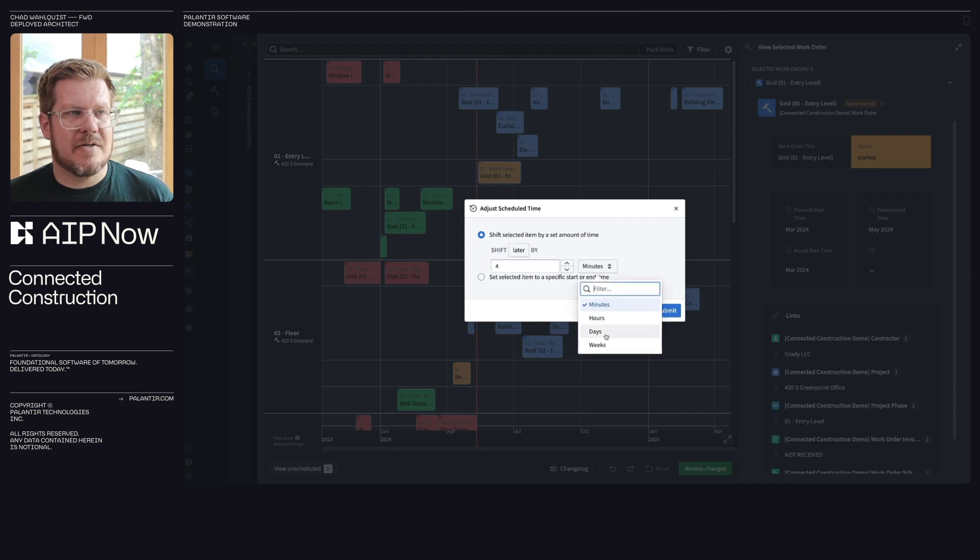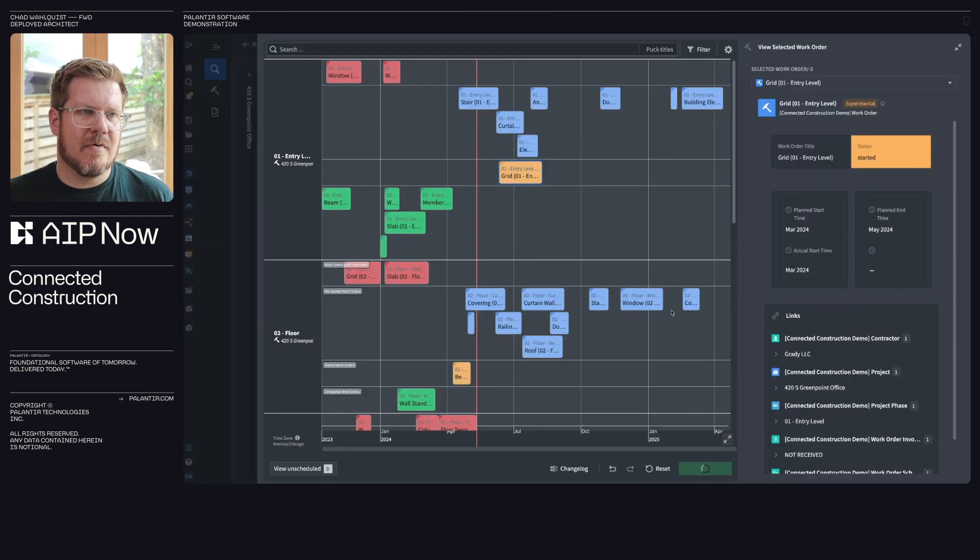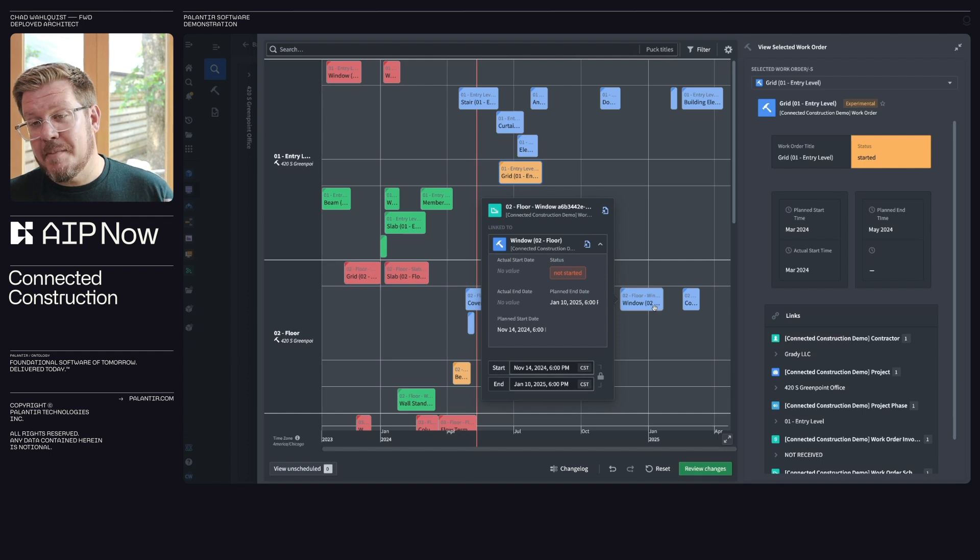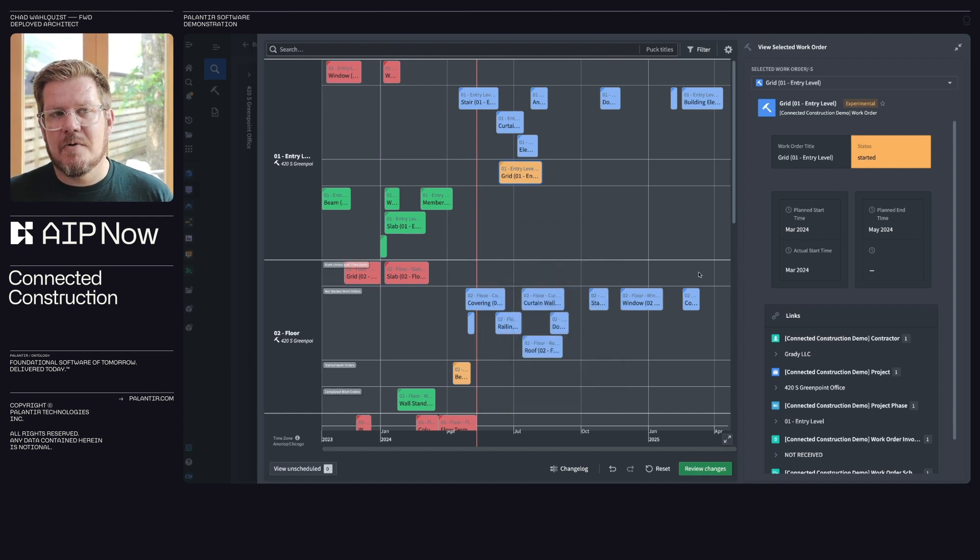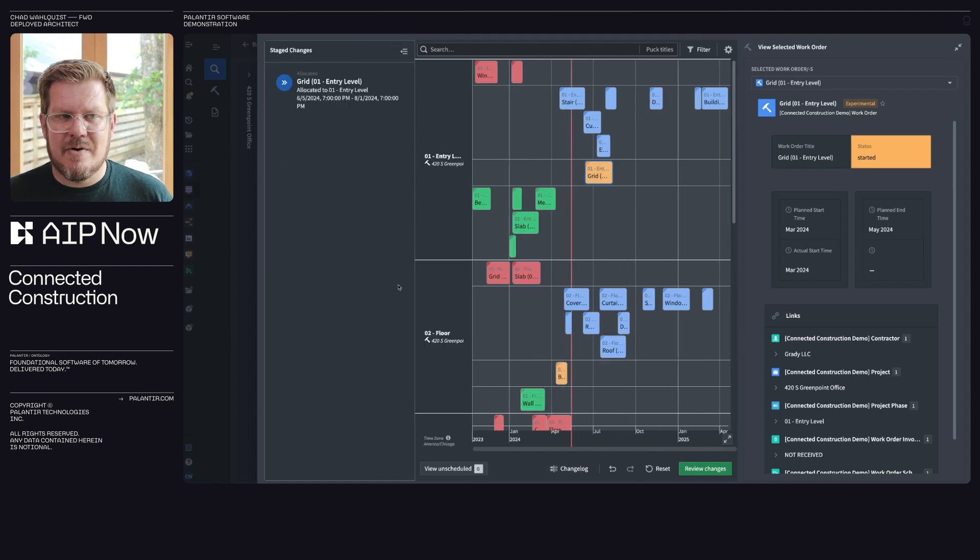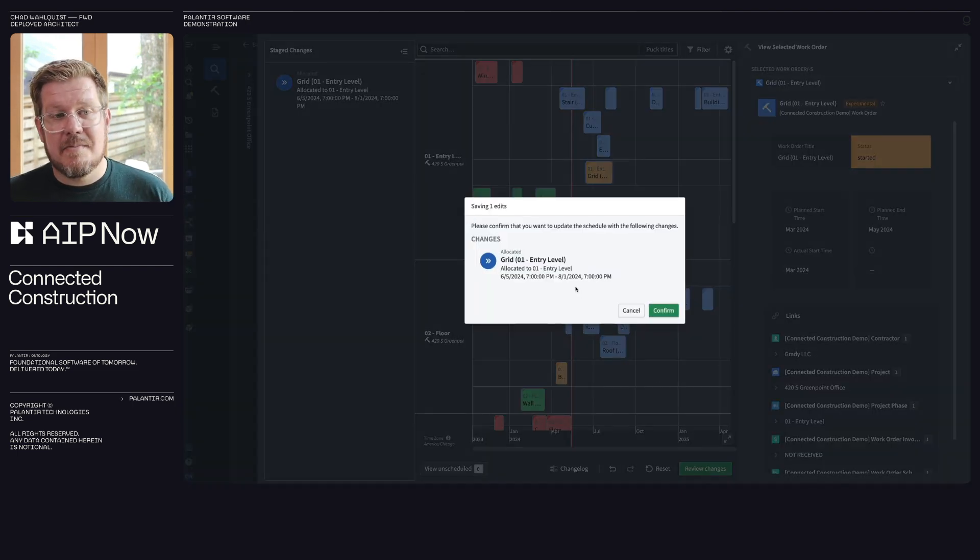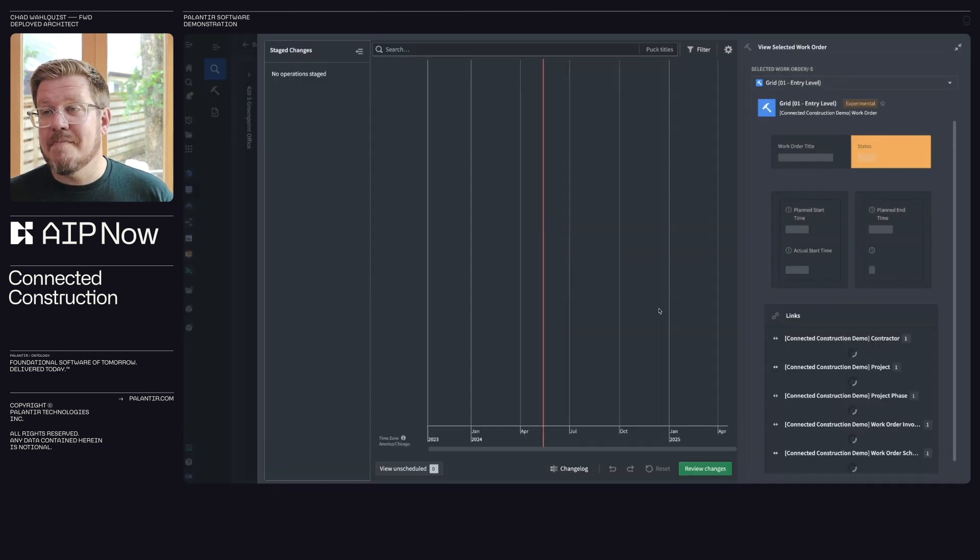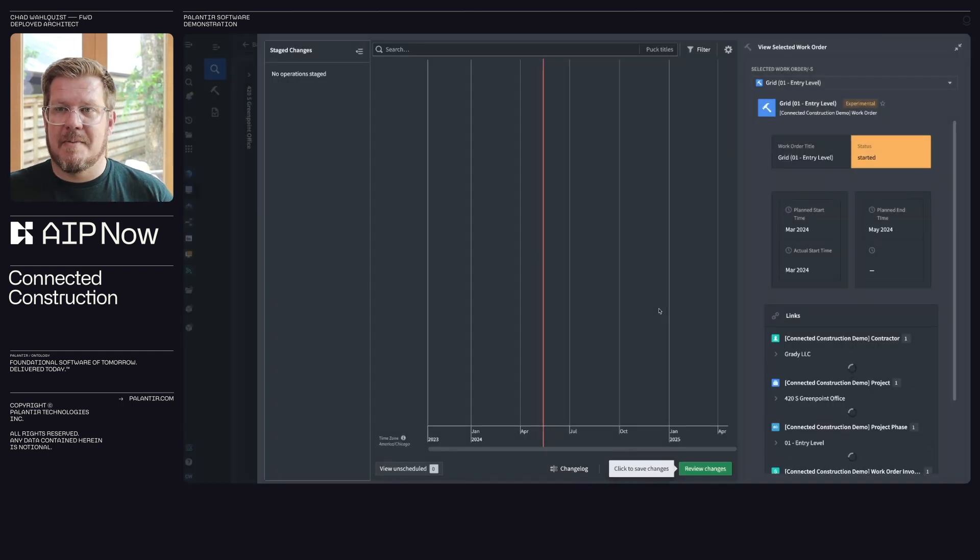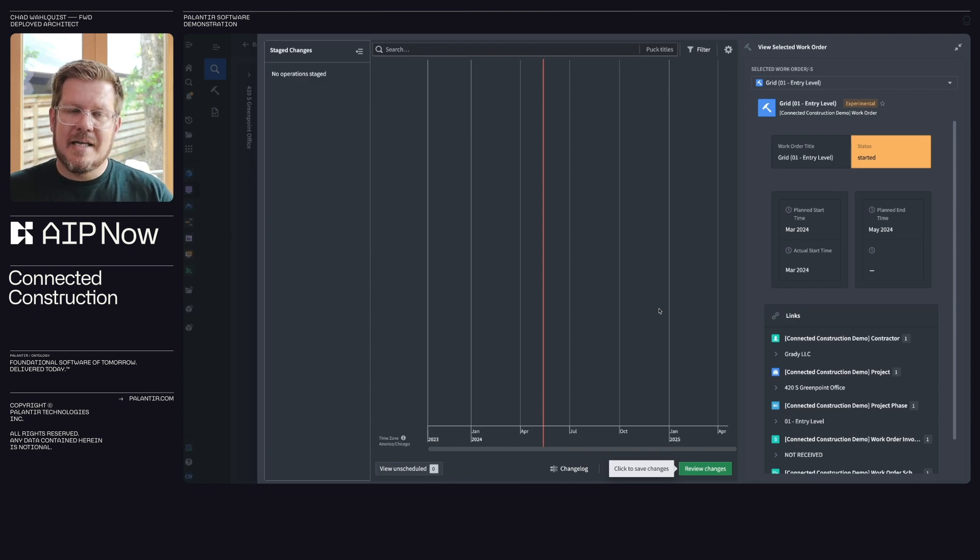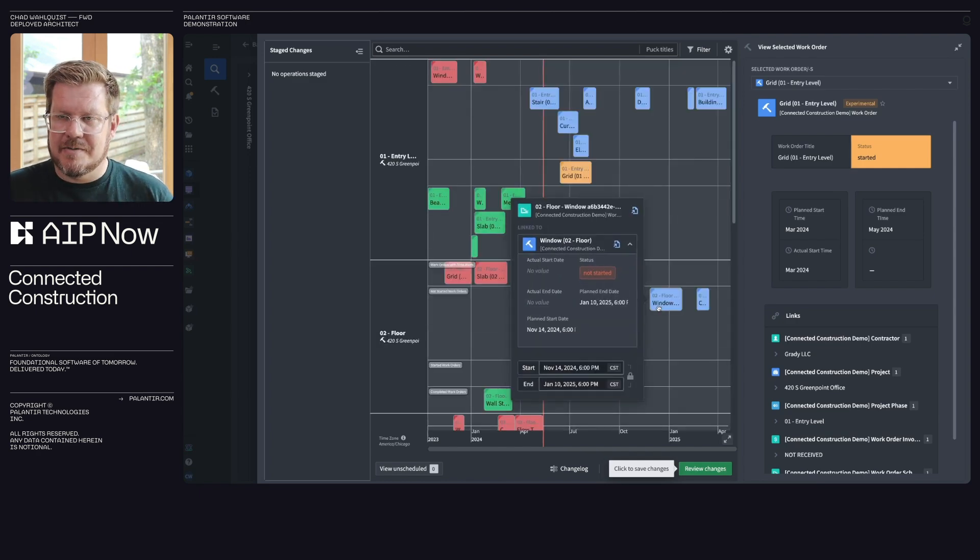So I can come in here and say, let's shift this back by four weeks, and then hit submit. So in the dynamic scheduling here, I'm working in these scenarios to play out what all these different changes will look like to my overall project plan. So right now, I'm just actually playing the scenario so I can see the changes that I'm going to make. And then when I'm done, I can actually hit review on those and then submit them back to P6 to make it the operational truth of my business now. So again, this is closing the entire loop, integrating across all those systems in real time.